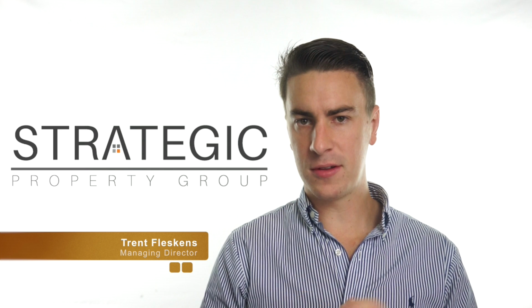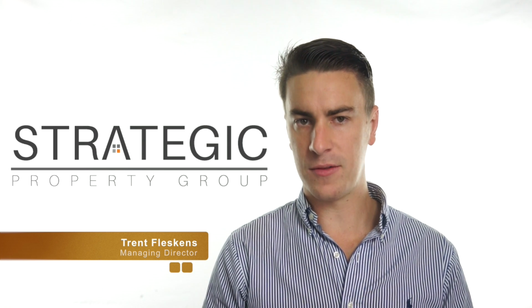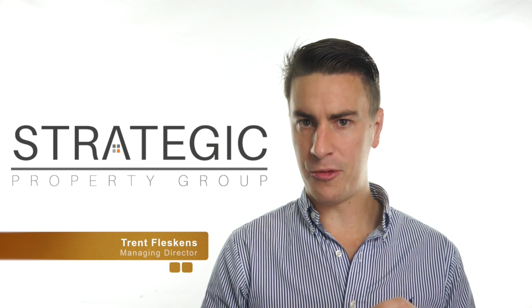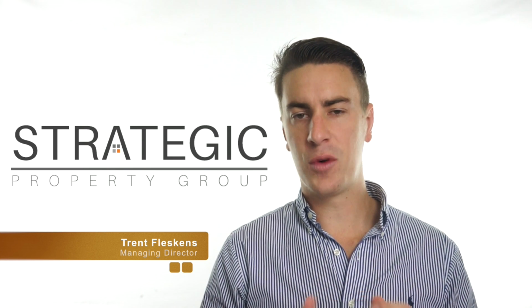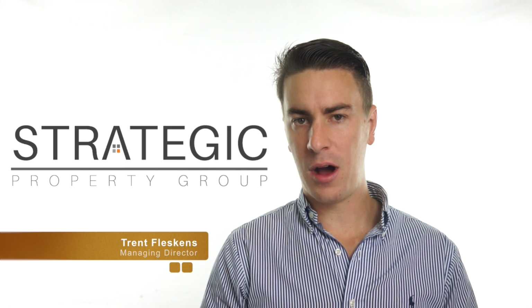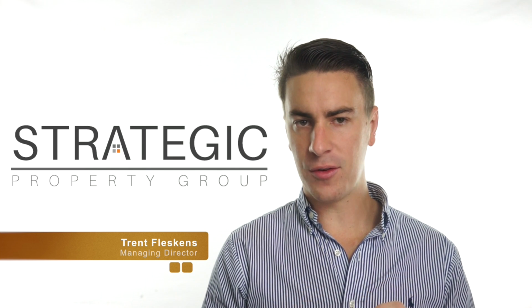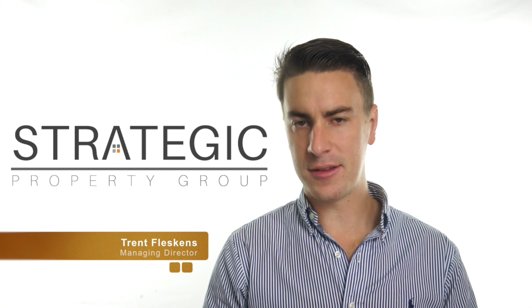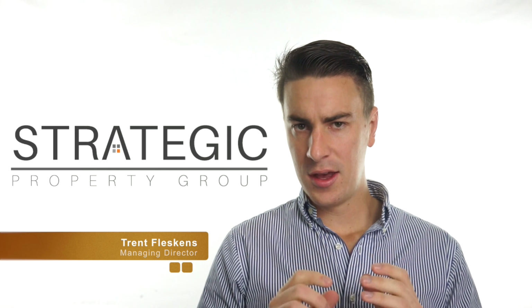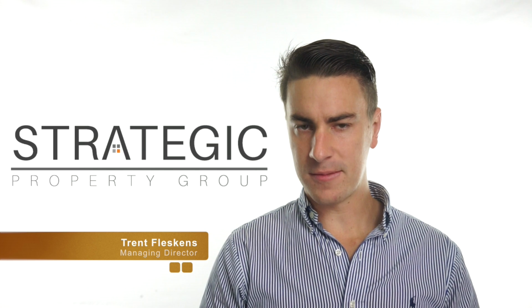One of the most time-consuming periods is the 90-day response time from the WA Planning Commission for your subdivision application. So getting this lodged as quickly as possible is helpful. Again, this can be done before settlement with the consent of the seller. However, hiring a consultant to ensure you are making the most of the zoning with the best block configuration is extremely important at this stage, meaning the difference between tens of thousands of dollars. So whilst you can lodge these yourselves, I do recommend seeking professional advice here.